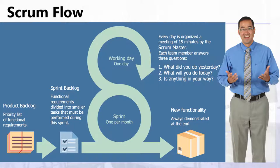Every day you meet for about 15 to 20 minutes — some done meetings run about half an hour for complex projects, but aim for 15 minutes as your stand-up. Each team member answers three questions: number one, what did you do yesterday? Number two, what will you do today? And number three, is anything in your way or blocking anyone? That's the specific Scrum flow as part of agile project management.